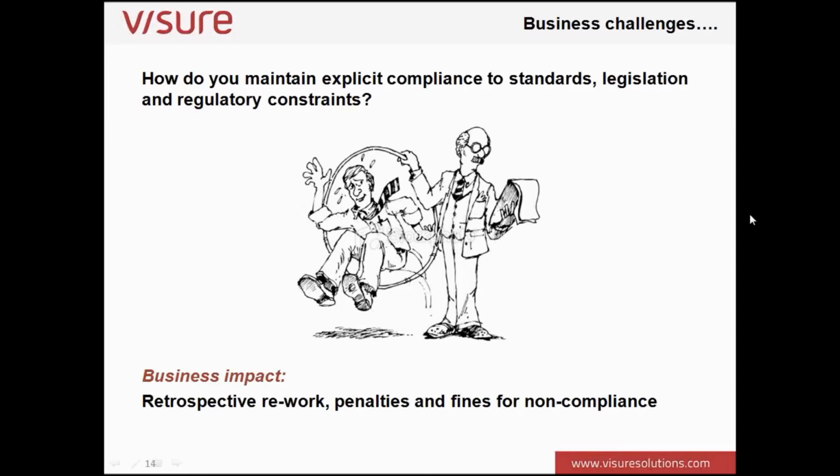And you've got to draw out, they then become the requirements, and you seek agreement with your customer that says, you said you wanted compliance with this standard, well, on this instance of this project, only these parts of the standard are actually relevant. And that's really important.